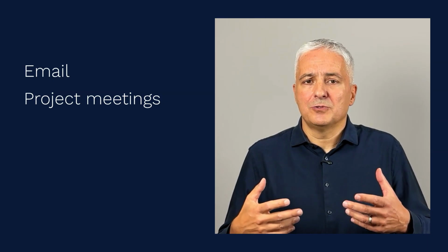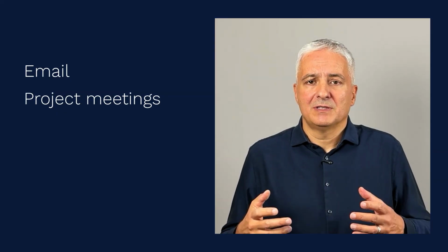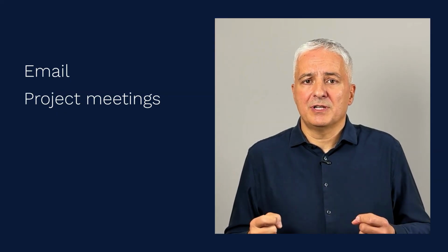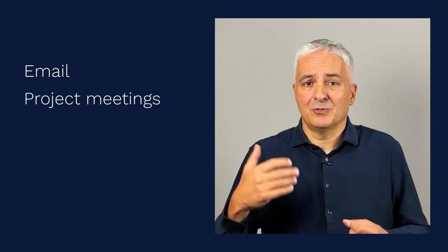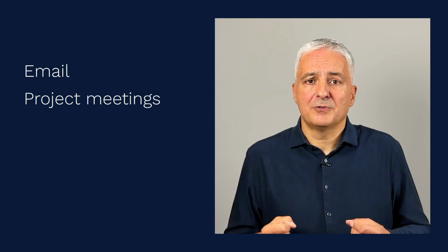Now, it is not needed that you record these project meetings, but as a minimum, you should create some kind of a summary from each of these meetings and send this summary to the project manager, so that it is confirmed that really this is what was discussed and agreed on.